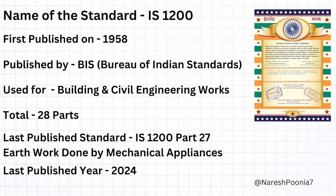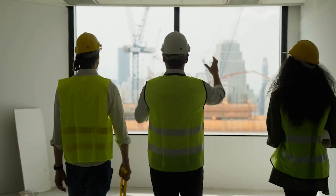Now let's talk about another standard — this one mainly for India. IS-1200 is used widely in government projects of CPWD and even private players use IS-1200 in the industry. The first edition of IS-1200 was published in 1958 by BIS, the Bureau of Indian Standards, and it is used for both civil engineering works as well as building works. IS-1200 has 28 parts, and some parts were even revised in 2024, so you have to check whether the part you are using is the latest version.